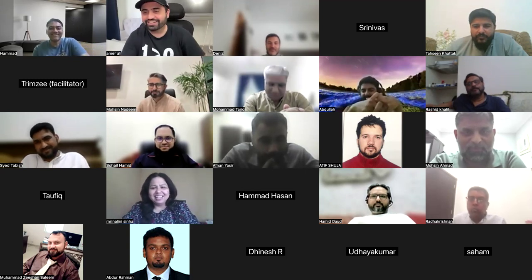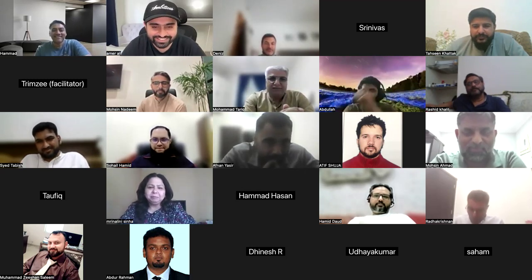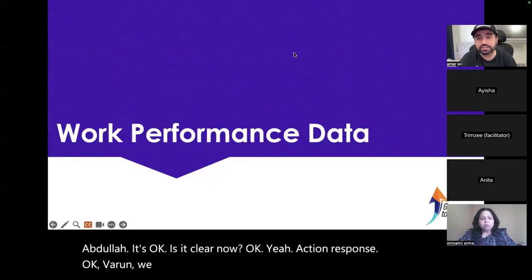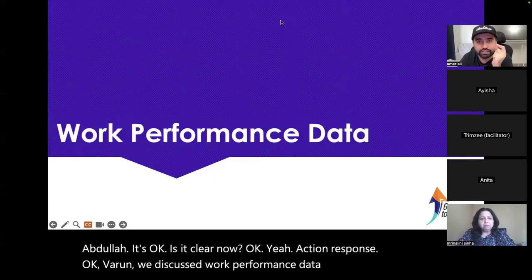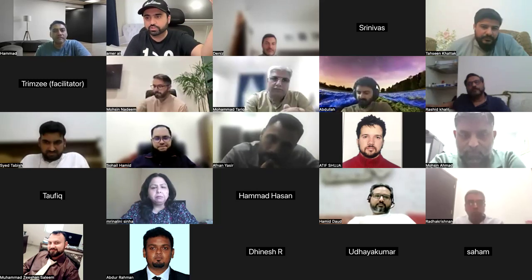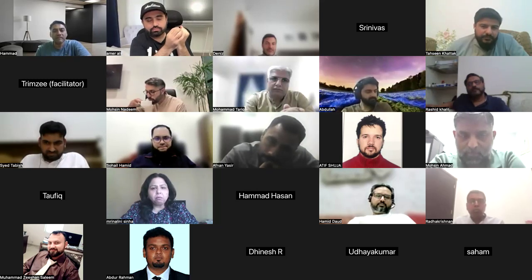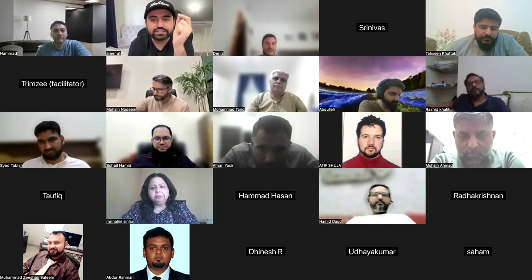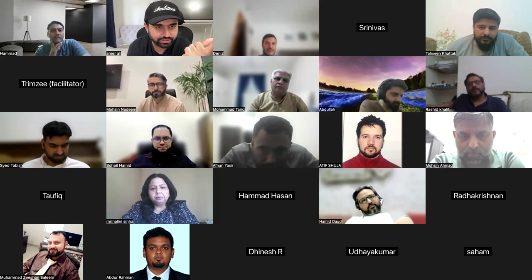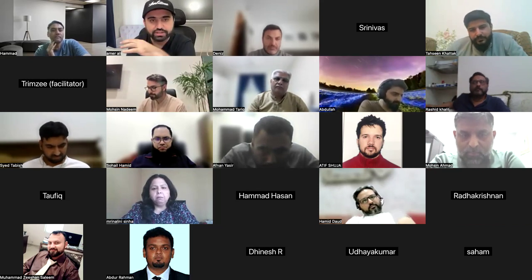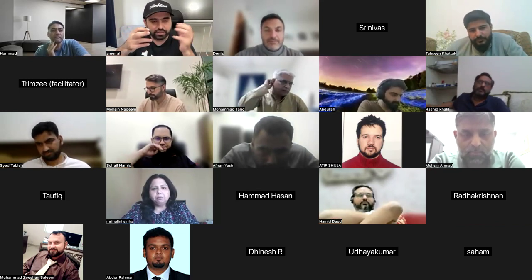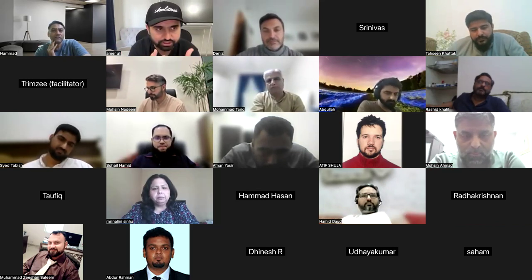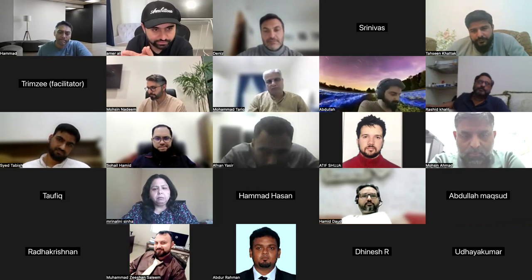Action response. We discussed work performance data. The lowest form of information, the information you immediately get from the team, is called work performance data. It goes to each department, which converts it according to their requirement. It becomes work performance information, level 2 data.